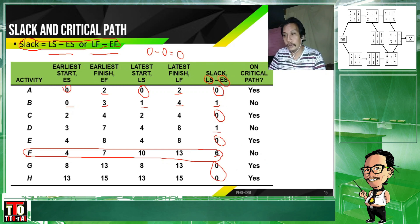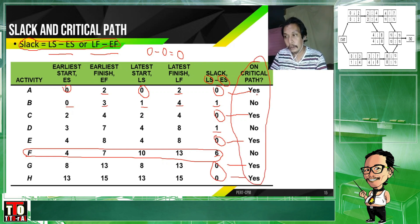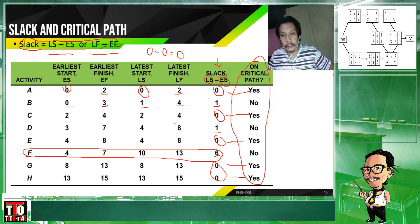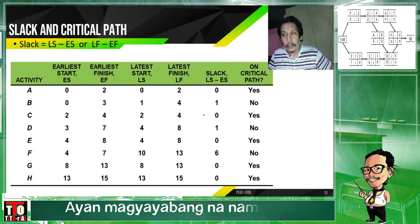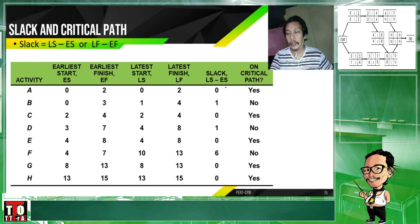Notice here that those with zero slack — yes, they are on the critical path. But those with non-zero slack values are not. However, don't be misled here. Before you answer whether an activity is on the critical path or not, I suggest you solve the slack values first. There is also an easier way to determine the slack value and which ones are critical activities directly from the network, without needing this table.